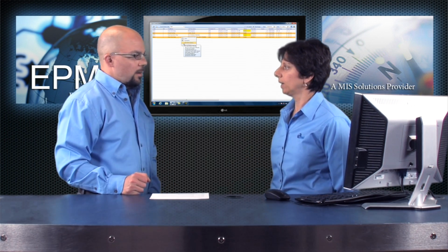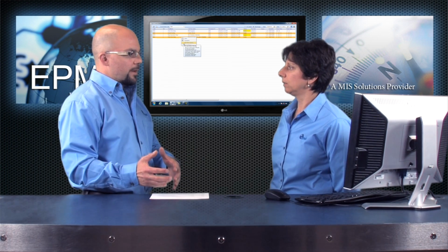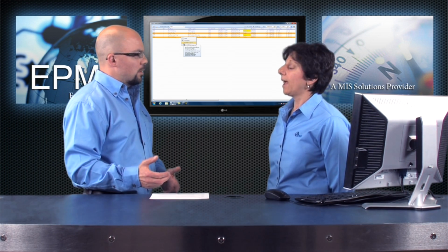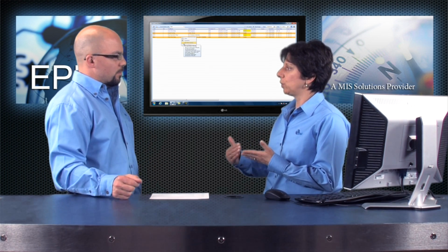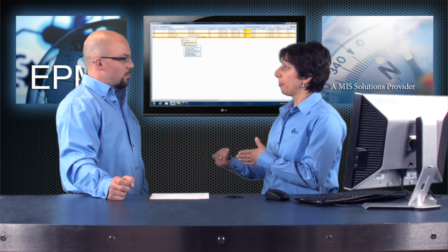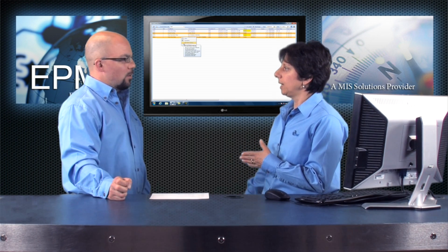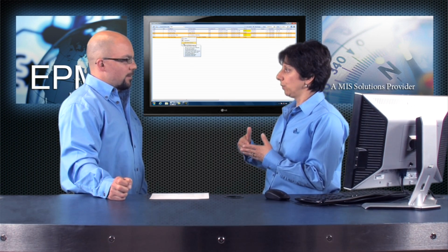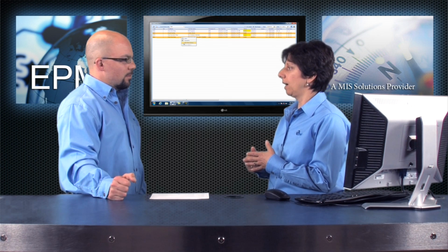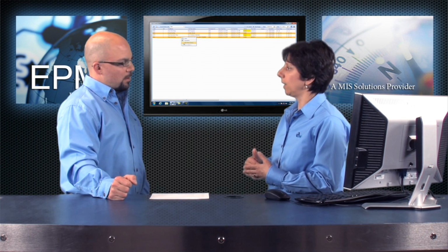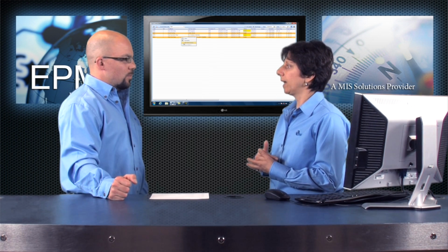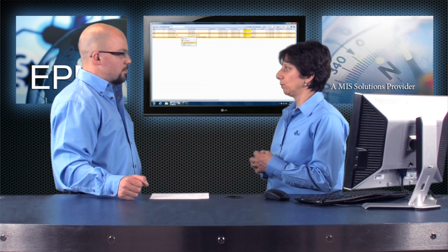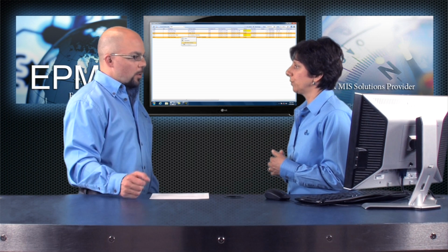Okay. If I do move a job, is that going to reschedule the rest of the job too? Actually, it does not. What it will do is it'll move the job to that new time period, and then it will leave everything else alone. If you want to reschedule the remaining items in that job, then you need to do that from the Gantt view and do it one at a time. And if you remember from last week, when you move an item in the Gantt view, it'll ask if you want to reschedule all the items. So let's do a move and we'll look at that.